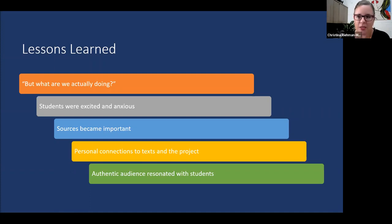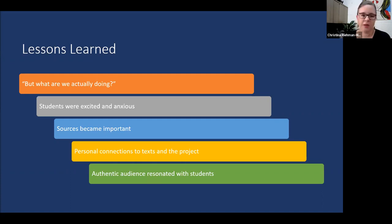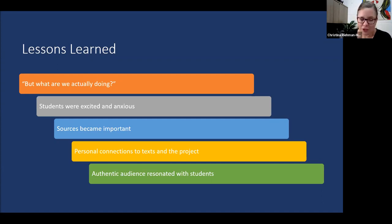Like Brian, we had lessons learned that really informed the Open Pedagogy Project Roadmap. In terms of challenges, we needed to do more signposting throughout the course because students had a lot of questions about what they were actually going to be doing. Writing for a public audience and writing formats like footnotes and introductions were not formats they were used to — they were used to traditional final essays seen by the professor alone — so that created some anxiety and discomfort. We learned to add additional consultation time to answer questions and additional peer review to address that discomfort and anxiety.